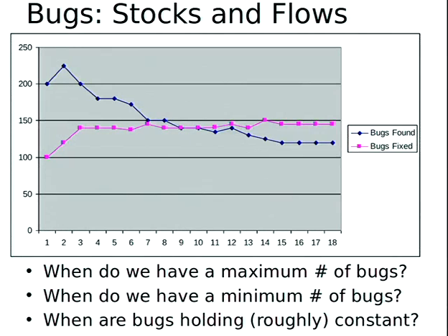And this is generally what happens with projects. Initially, the number of bugs found exceeds the number of bugs fixed. It actually doesn't go quite so linear. You actually get a ramp up as the testing infrastructure gets going. But initially, found exceeds fixed. And then later on, hopefully, the number fixed exceeds the number found, and it ends up declining. But the net upshot is that you see a real increase in the number of bugs in the system, sort of mid-stride here. And you'll see this project after project after project.